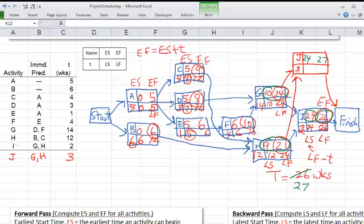Well, J could only be done at 27 weeks. So the total time is now 27 weeks. So this is what we would use to start the backward pass. So for LF of J, we would put down 27, and also for LF of I, we would put down 27.